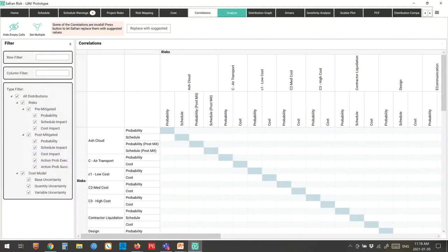Now, in older tools like PRA, we used to associate correlations between activities. Now, that was a bit difficult because, again, if I had multiple uncertainties on one activity and not on another activity, I couldn't correlate the activities to each other.